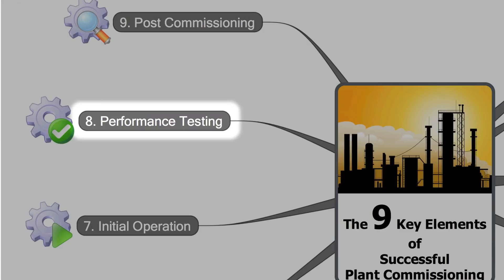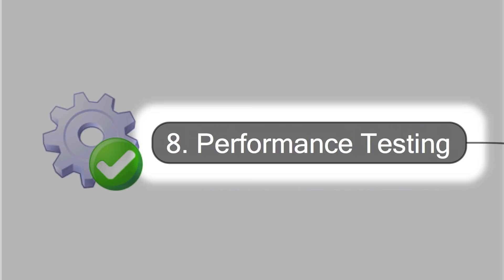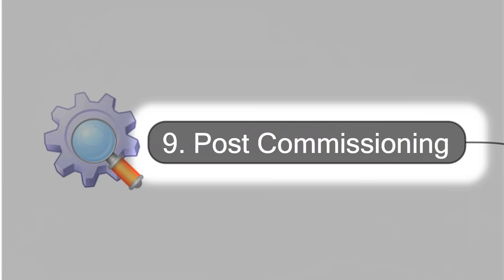During the post-commissioning phase, a reduced commissioning staff will take care and close open punch points. Don't underestimate the time necessary for post-commissioning activities.